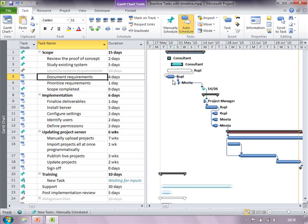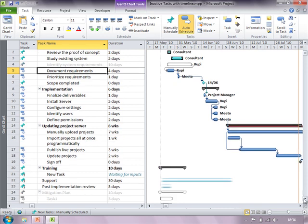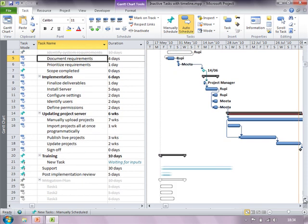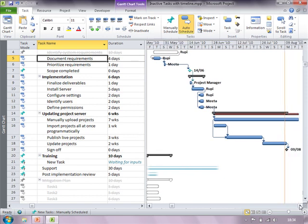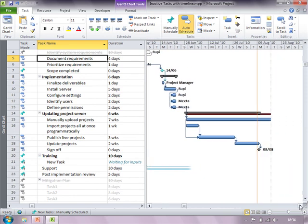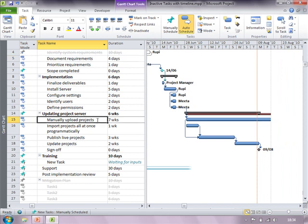Let us consider some real life examples in which inactive tasks will be very useful. I have a summary task here called updating project server. There are two ways in which I can update project server: either manually upload projects or import all projects at once using some code. Now depending upon the resource availability, depending upon the budget, and depending upon other environmental factors of the project I might choose either of the two ways.